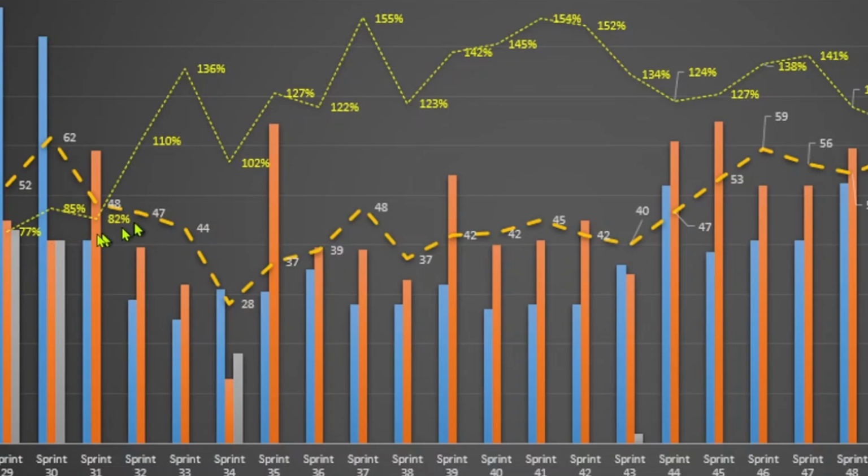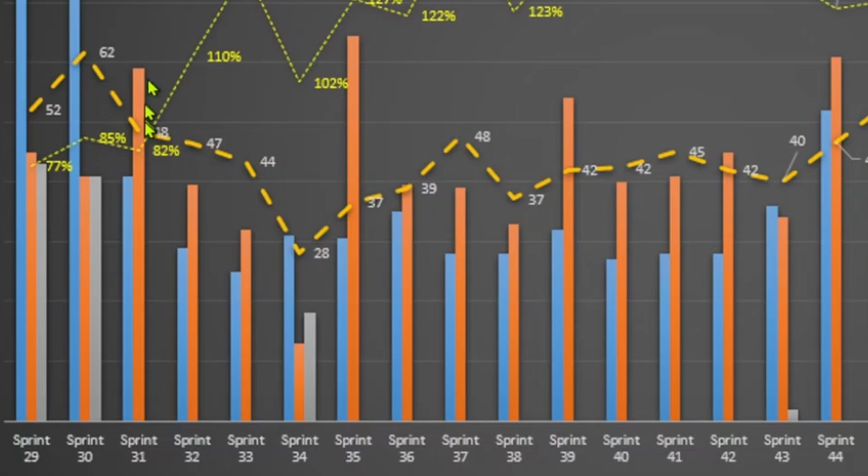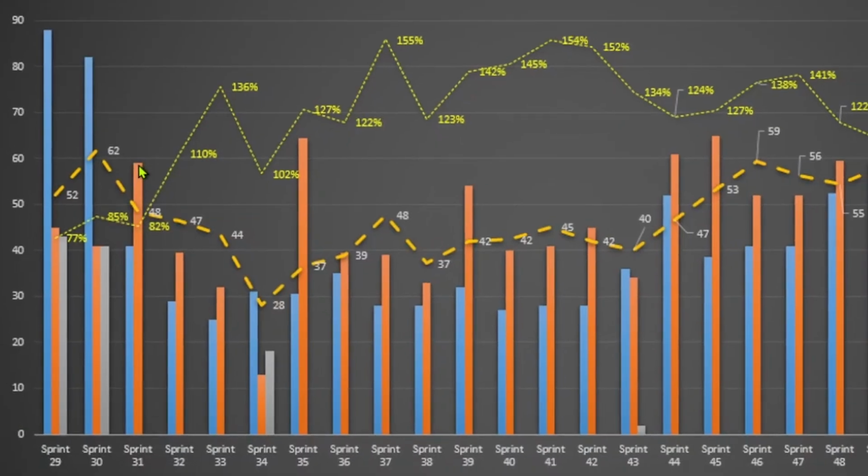So they figured that since they'd only completed about 40, the next sprint, they would take on the same amount. And guess what they did? They got that done and brought in some stretch goals. Now they're starting to figure out, okay, under commit and over deliver. Now, an interesting thing happens if you watch this. Under commit, over deliver. Under commit, over deliver.